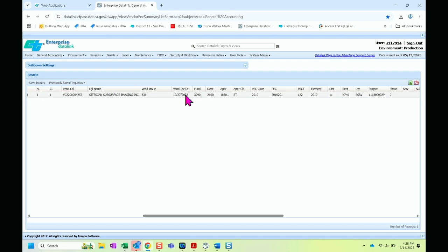And you can check it to make sure. If you don't see an invoice paid, you know it's still in flight and accounting is still processing. 45-day payment, prompt payment act, 15 days for you, 15 days for accounting, 15 days for SEO to pay, right? So you can track your payments by just clicking to see the history on these, okay?